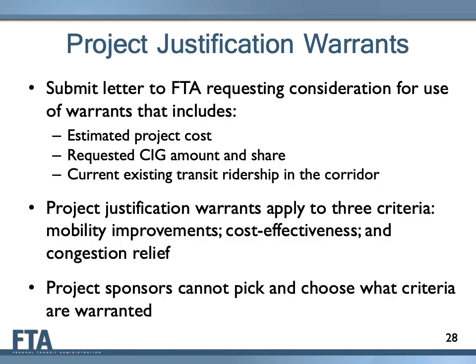Project sponsors submit a letter to FTA requesting consideration for the use of warrants. The letter should document the estimated project cost, the requested CIG amount and share, and the current existing transit ridership in the corridor. The How to Apply webpage in the CIG section of the FTA website contains instructions on how to document existing transit ridership in the corridor.